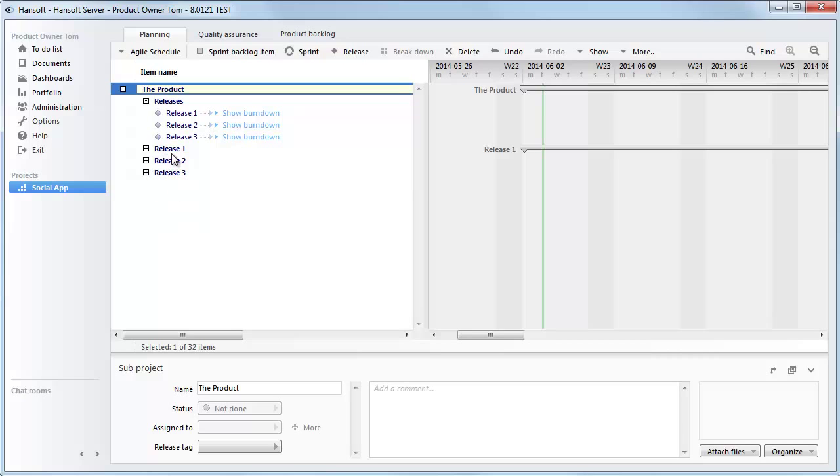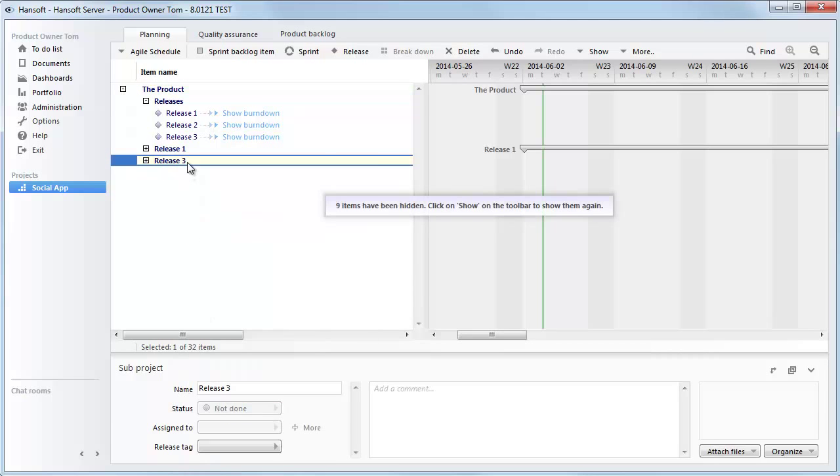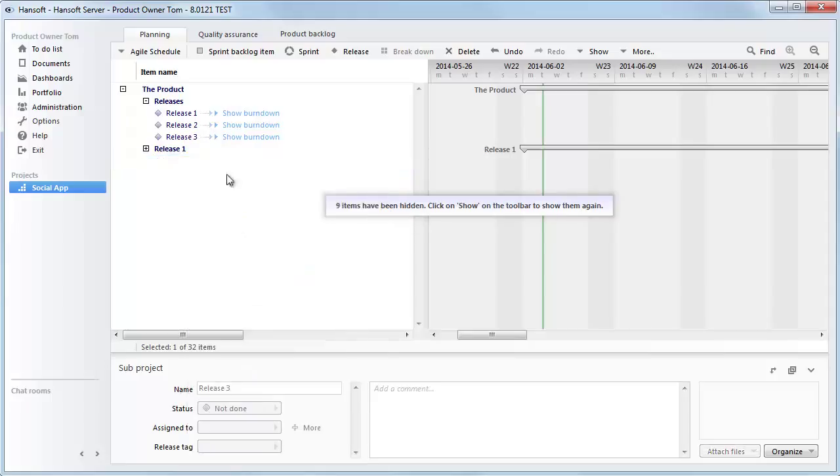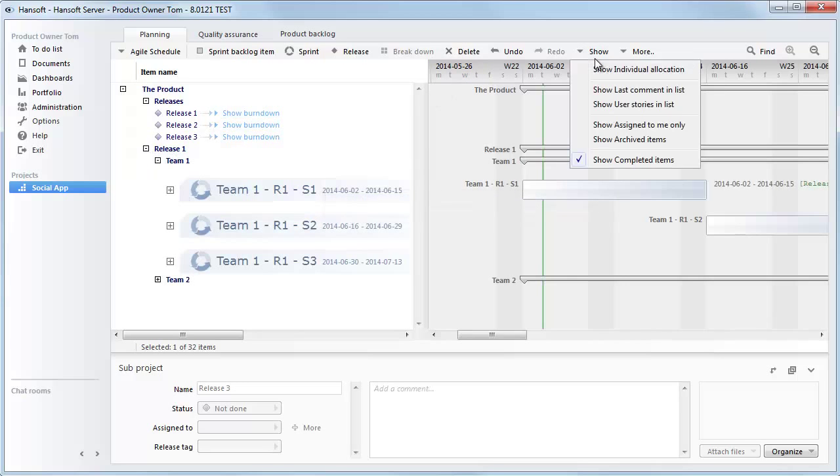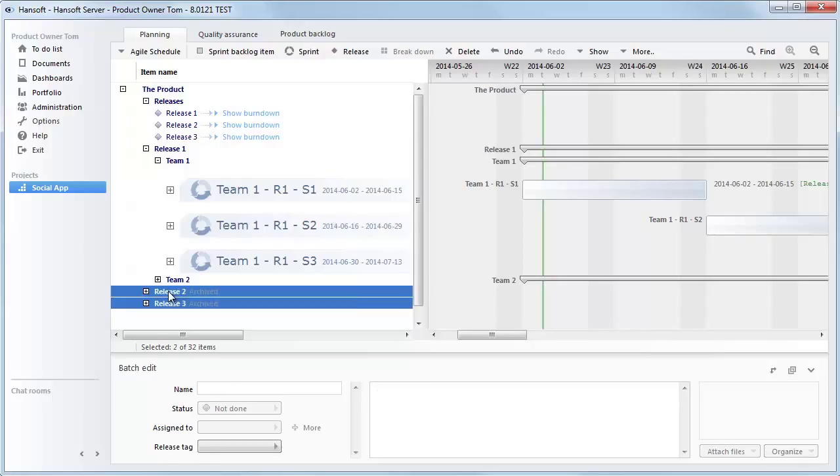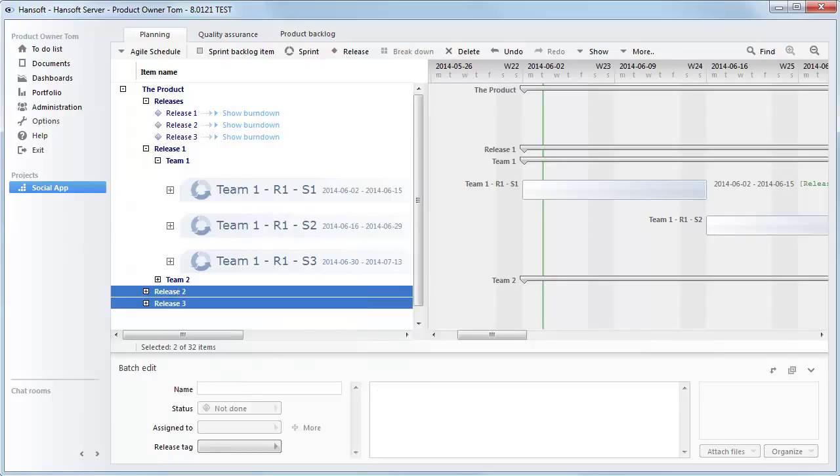This also allows us to do a rolling archive mentality, which means that we can archive the future items. We can still build them, just to have them ready. But we can archive them so that when people get into the schedule, they can just see what's current. We can always bring items back from the archive by just choosing show archived. And if we want to take them out of the archive, we can just right-click and choose remove from archive.